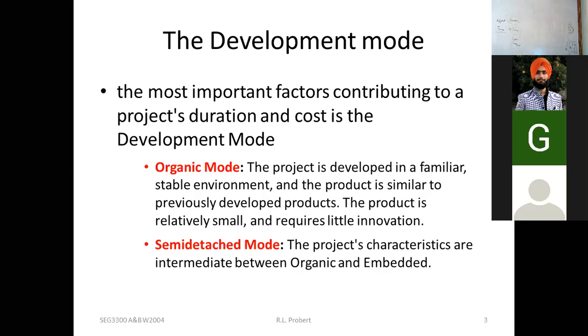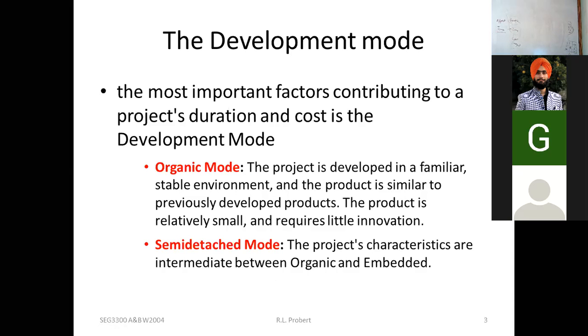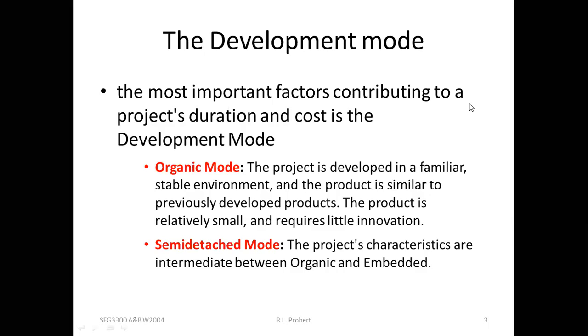Three modes are there: organic, semi-detached, and embedded. Organic mode is the mode in which the project is developed in a familiar, stable environment and the product is similar to the previously developed products. We can apply this organic mode to those projects that we have developed earlier.